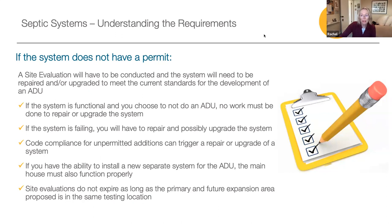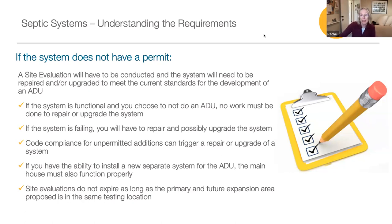However, if your system is actively failing, you will have to repair and possibly upgrade it. We also want to make you aware that code compliance for unpermitted development done after the system was installed can trigger a repair or upgrade if the system is not sized correctly. If you are one of the people who can install a new separate system for the ADU because your lot is big enough, please be aware that the main house system must also be evaluated and be functioning properly. Finally, if you decide to go forward with the site evaluation, please know that it doesn't expire as long as the primary and future expansion fields remain in the same place, so you have time to plan before beginning your project.